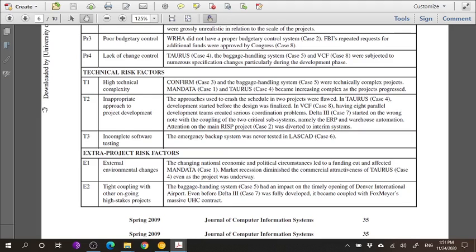Now, obviously, when an entire system is analyzed and designed, it is created as a whole functional system. If you attach more things to it at later stages, it's going to be a hodgepodge of various incomplete and complete components, and there will be a lack of integration and integrity in it. Imagine a building being constructed and adding new floors to it while you're doing the refurbishing of the interior. Obviously it's going to be a disaster. This is what happened in all 3 of these cases, which is case 4, 5 and 8, where more features were added during the development phase, causing tremendous problems, budgetary issues as well as the eventual failures.